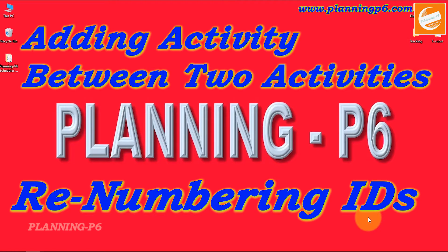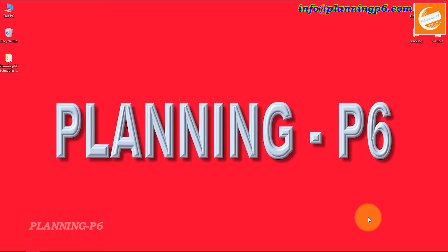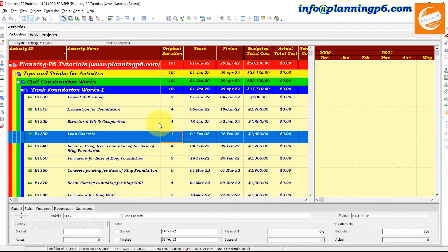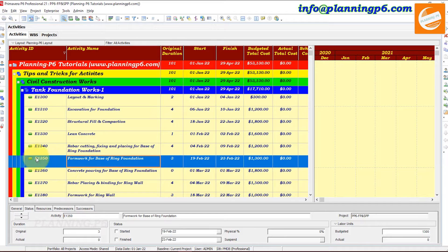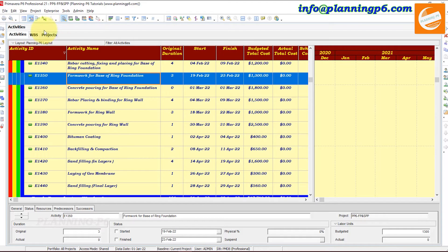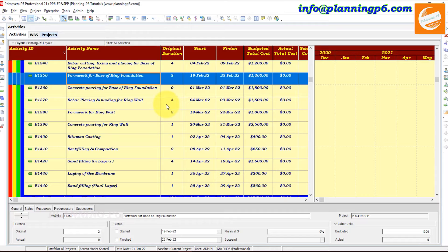I already have a sample project here. Before changing any activity or anything in the schedule, first remove your baseline, make a copy, and save the original source file — because whenever you change some values, some errors can occur, so you need backup files in your system.